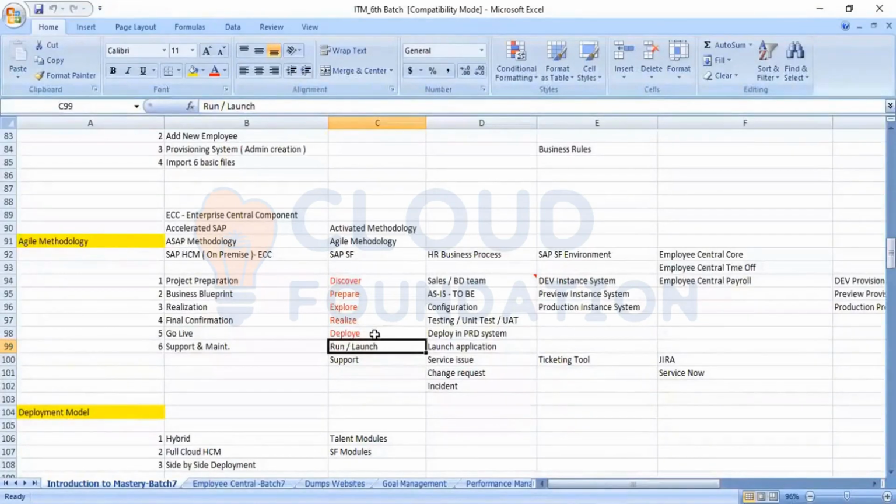Once the process kit has been completed, they will go through the KT sessions with the support team as per the document, and all the documents and everything will be shared. Within these 30 or 45 days, if any issues or errors come up, all the ongoing issues and errors will also be shared with the support team. After the hypercare period, there will be an effective date, and from this effective date onwards, the issues will be taken care of by the support team.